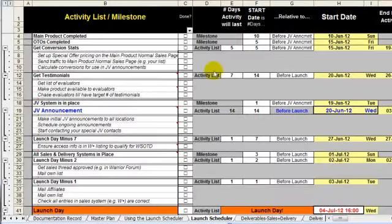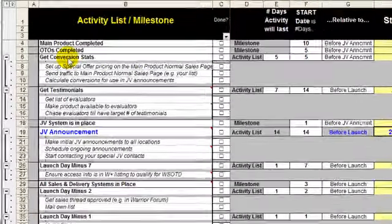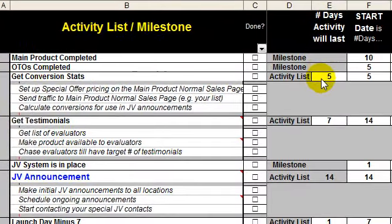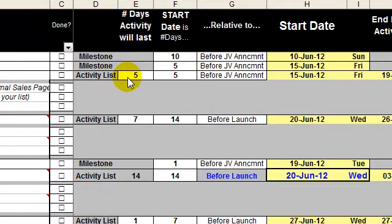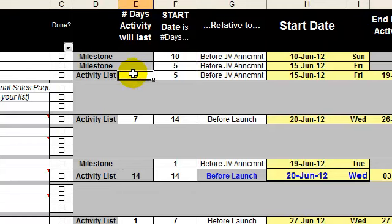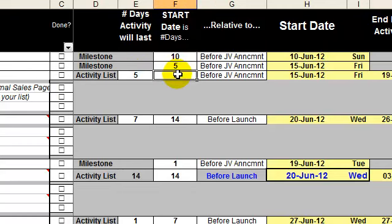For an activity list, such as get conversion stats, the same thing applies, except now I can also state how long this should take. So I'm saying that getting conversion stats is going to be spread over five days. That's that cell there, starting five days before the JV announcement.